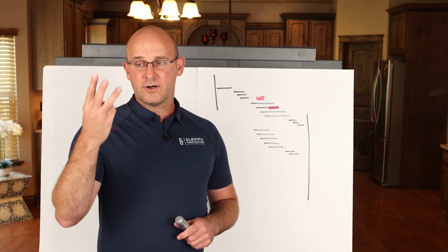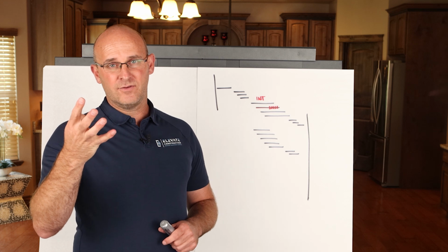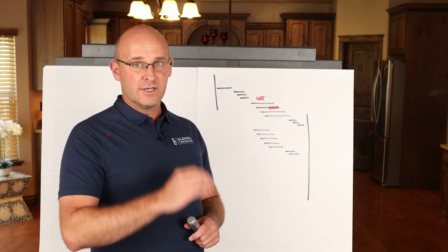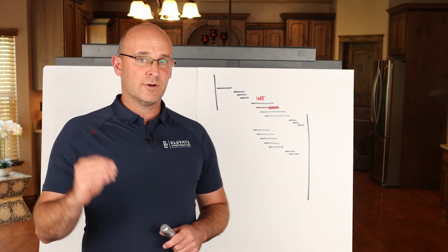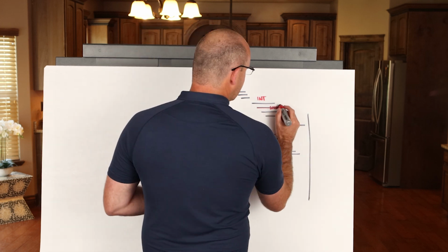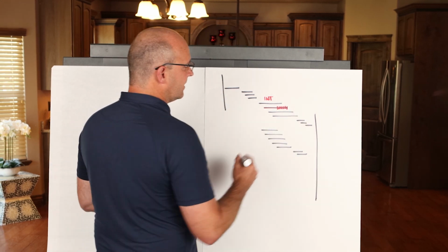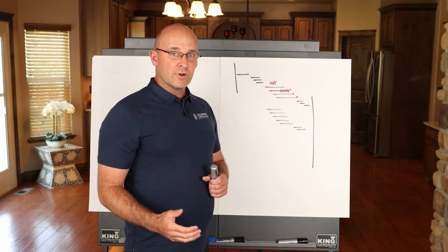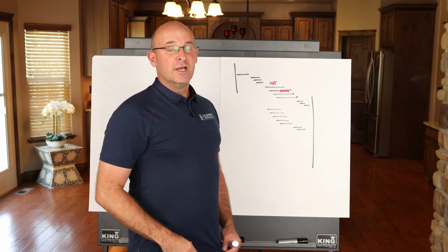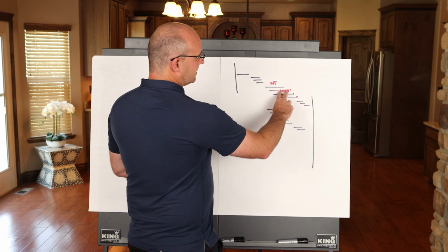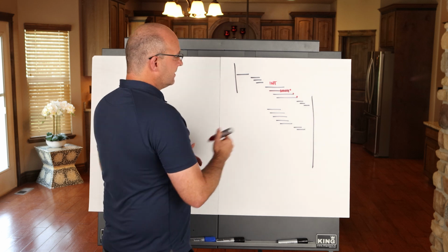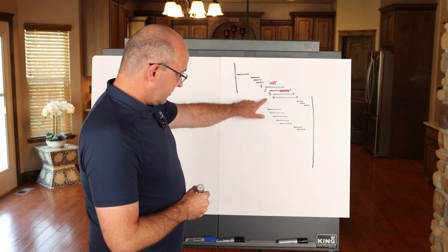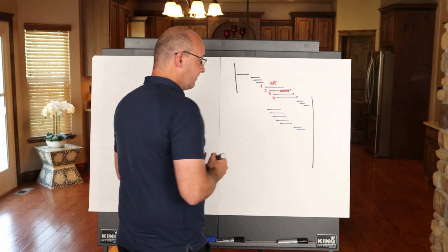So you have power, you have water, you have your duct, and you have your controls cabling connected to the actual equipment, and they've done the point to point on each of the pieces of equipment per the floor, and we're ready to go. So once the pre-functional checklist is in here and the point to point is done, that kicks off a milestone on every floor that says, hey, we're ready to do the point to point throughout the entire building. So every specific floor, I'll have these commissioning activities inside that sequence. Let's say this was zone 1, 2, 3, 4, or maybe it's floor 1, 2, 3, 4, whatever, but I'll have it at every floor.